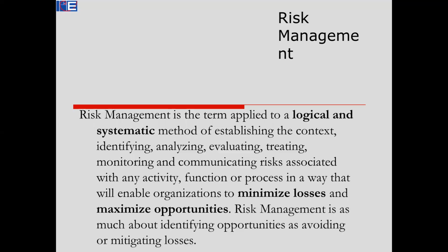Is the term applied to a logical and systematic, you've got it, that's important, method of establishing the context, and we'll look at that, identifying the risks, analysing the risks, evaluating them, treating them, in other words, trying to minimise the impact of them, monitoring, making sure that it's still working, and communicating risks associated with any type of activity, function, or process in a way that enables the organisation, in other words, the event team or the sponsors, to minimise losses. And here's this, maximise opportunity.